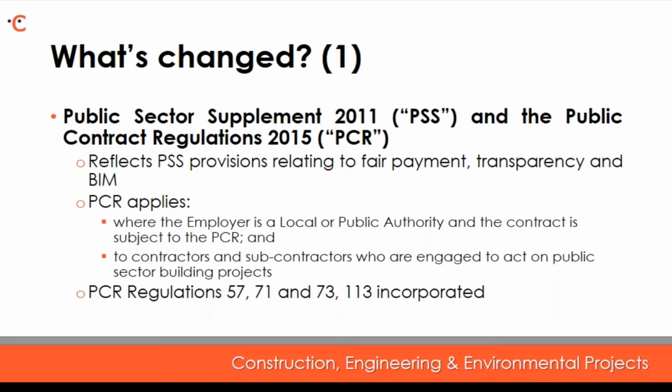Another change is in relation to the Public Sector Supplement 2011 and the Public Contract Regulations 2015. So the 2016 edition contracts have been updated to reflect the Public Sector Supplement provisions, and that's in relation to fair payment, transparency, and BIM, and they also incorporate various aspects of the Public Contracts Regulations 2015.